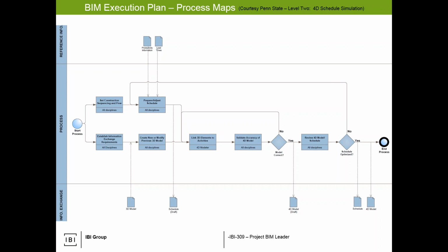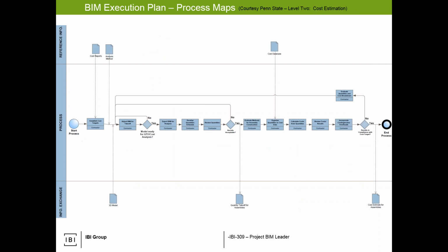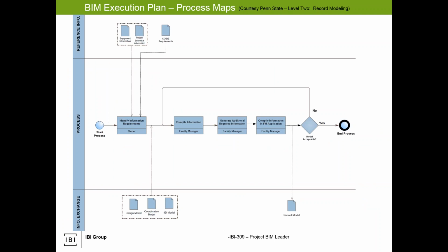What's our obligation? What's their obligation? And it goes right back to scope management and project management relative to don't do more than we have to do, and don't get drowned in the technological aspects of schedule simulation, especially if it's not our responsibility as designers. Similar with cost estimation. We can get quantities, but the contractor is really the one who's driving this entire process. And you can see here contractor is listed throughout the whole thing.